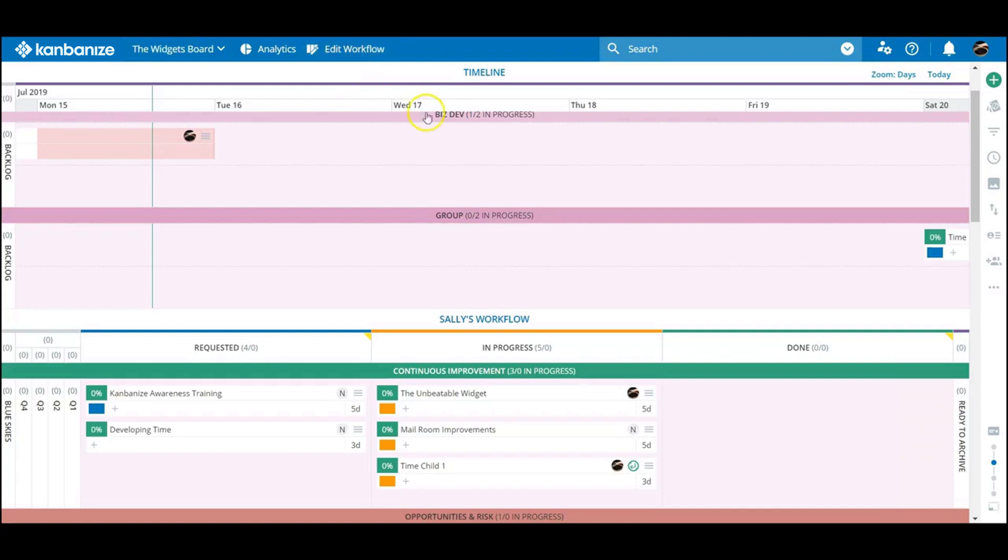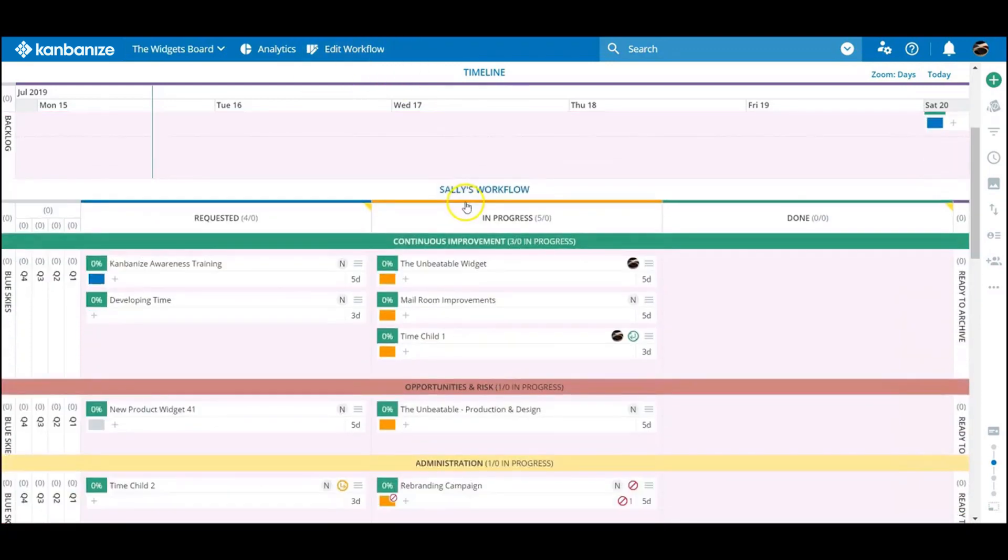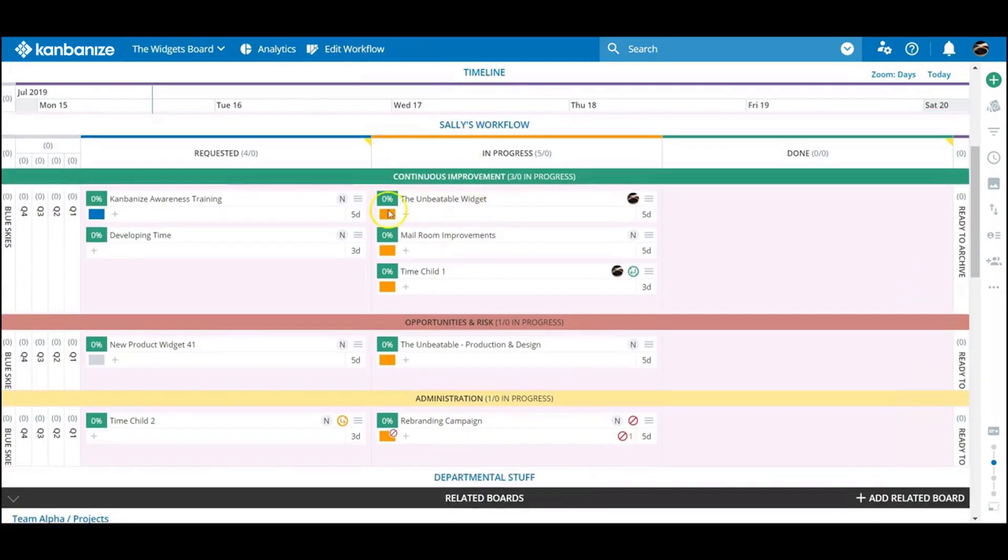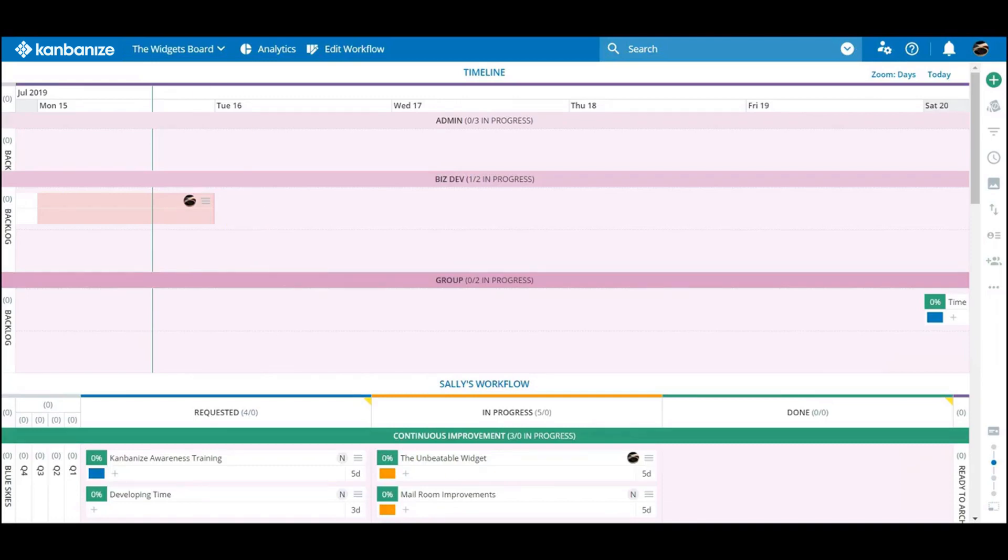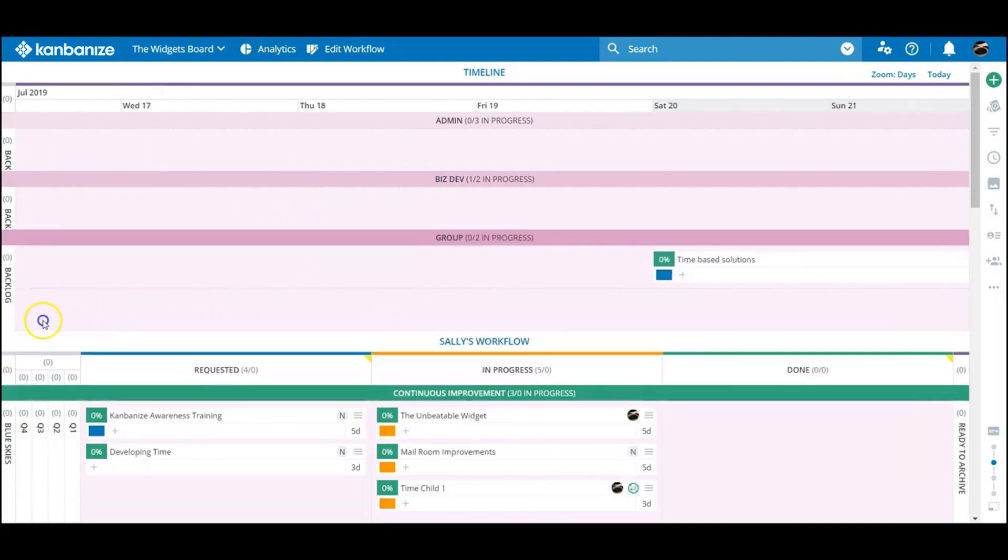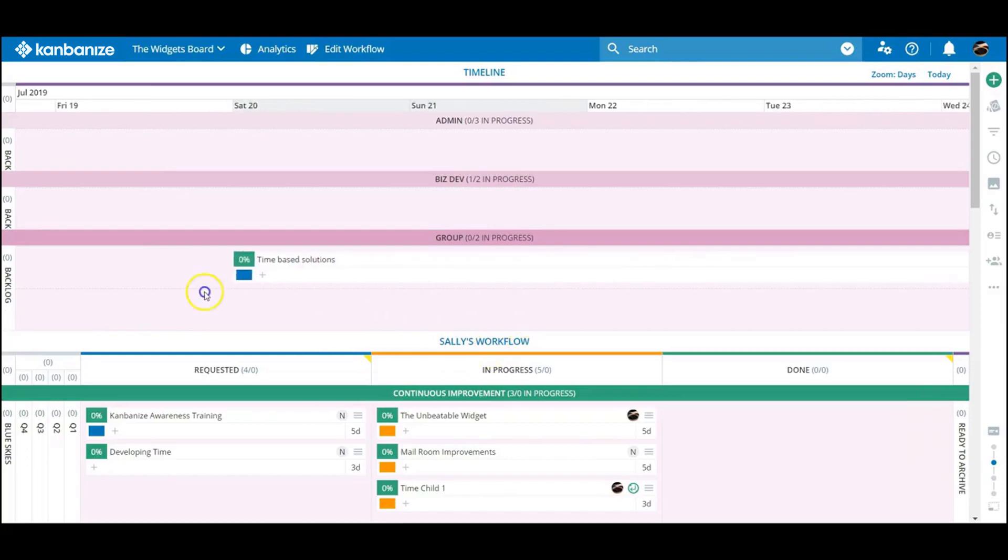The timeline is not a replacement to the initiative lane, rather it works in conjunction with it to add another layer of intelligence to the workflow. Drag the right-hand end of the timeline thread to the point where you'd like to see the initiative completed and the left for the approximate start date.